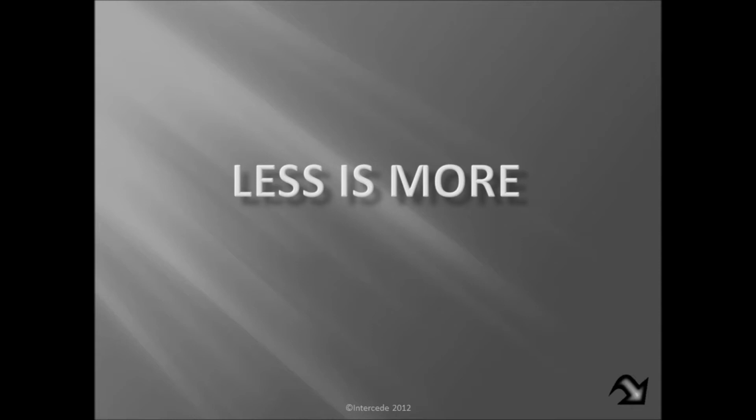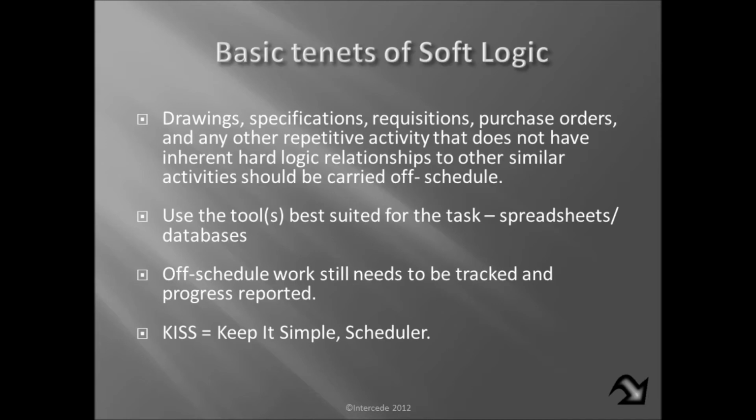So, the basic tenets of soft logic, like we mentioned before, apply to the drawing specifications, requisitions, purchase orders, and now any bulk installation or repetitive activity that does not have an inherent hard logic relationship to other similar activities. These should all be carried off schedule.